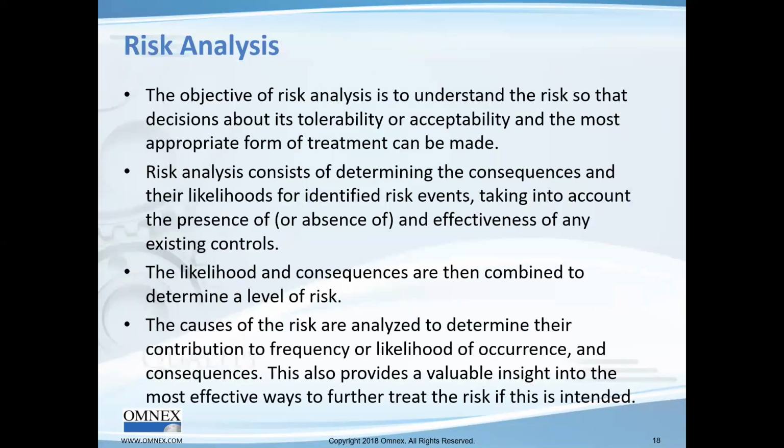So risk analysis, the purpose is to understand the risks so you can make decisions on the tolerability and acceptability of the risk and the most appropriate form of treatment. So we've got to look at the consequences and the likelihood for the identified risk events, and then take into account any presence or absence of controls. Likelihood and consequences are then combined to determine a level of risk, and then the causes are analyzed to determine their contribution to the frequency or likelihood.